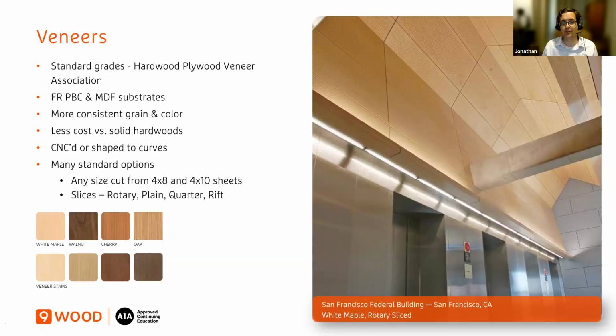And again, in terms of budget impact, veneers, apples to apples, are less expensive than a solid wood, soft or hardwood. It depends on the configuration, but if you're looking at the same amount of wood, like comparing 1x3 to 1x3 in a veneer and a solid, maybe I'm picking an extreme example, like maybe it's teak, a 1x3 and a teak veneer 1x3, the veneer will be less expensive for the same amount in a particular plank or panel.